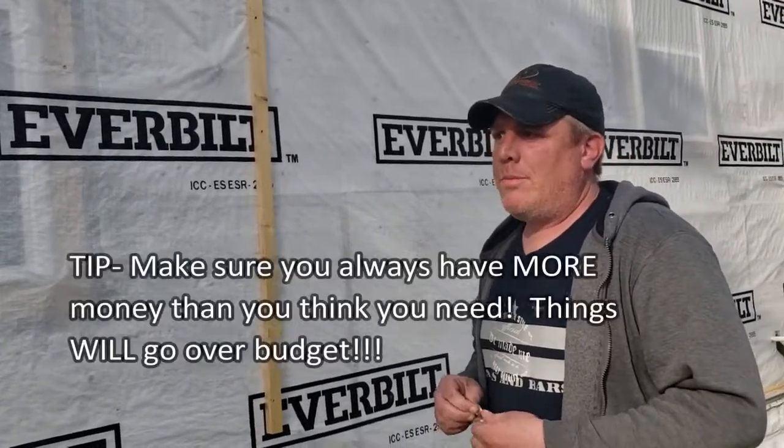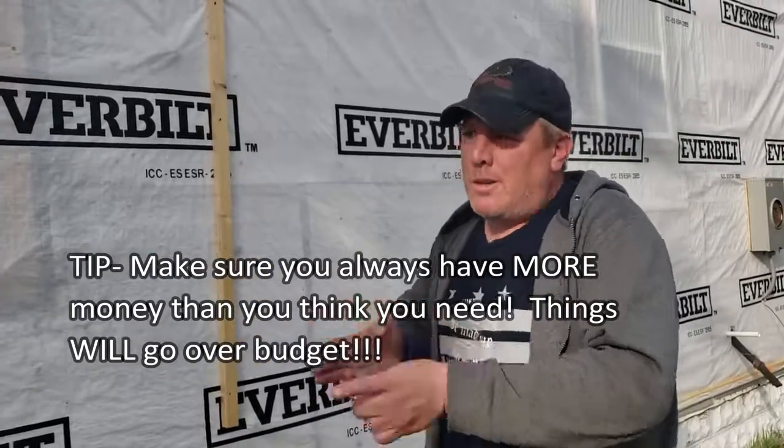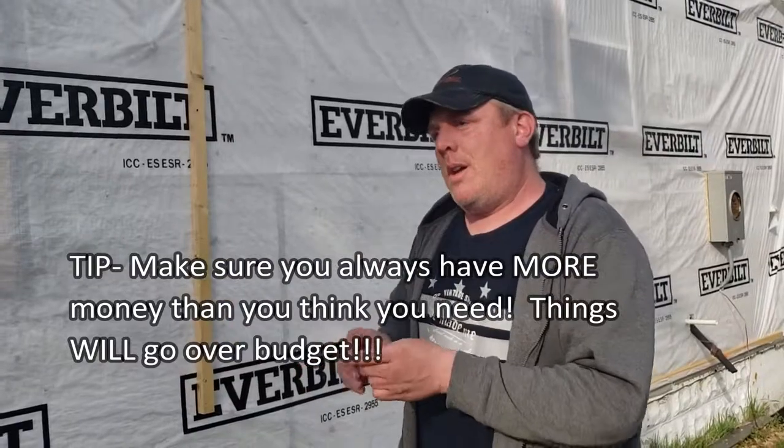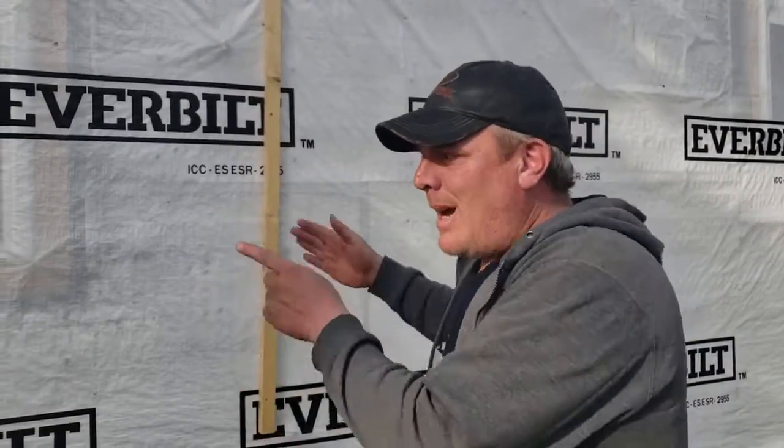What did you think the rehab was going to be, Chris, walking in the door? The last one I thought was going to be 37, ended up being 52. So we were budgeting to be between 50 and 65. Okay, that's where that sweet spot, the 70% rule, was right there between 50 and 60. And we did a couple things beyond the scope of work that didn't cost us as far as time, but it cost us in our initial plan.